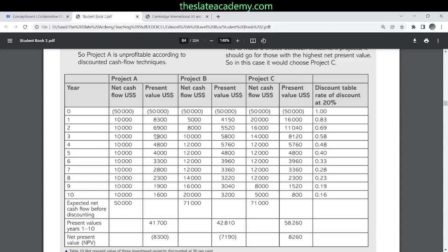And that is sometimes what we do. For example, for these projects, even at the end of their life, since the net present value is negative 8300, this project won't pay back even in 10 years. Whereas if I were doing the simple payback method, I'd see that this project pays back in 5 years. So what is this new method called? This method that we discussed is net present value. But if you use the payback period using discounted cash flows, this is called discounted payback period.